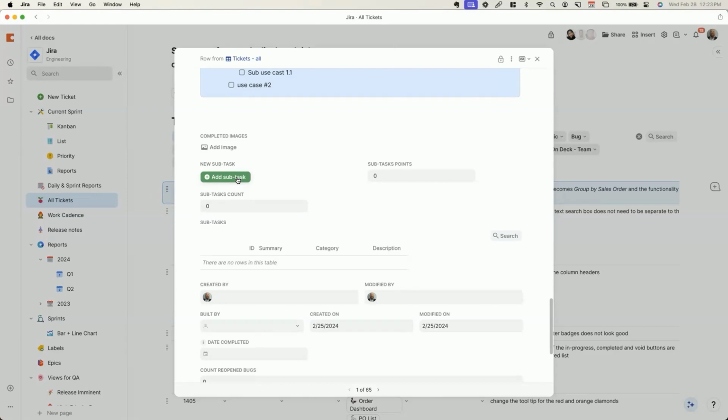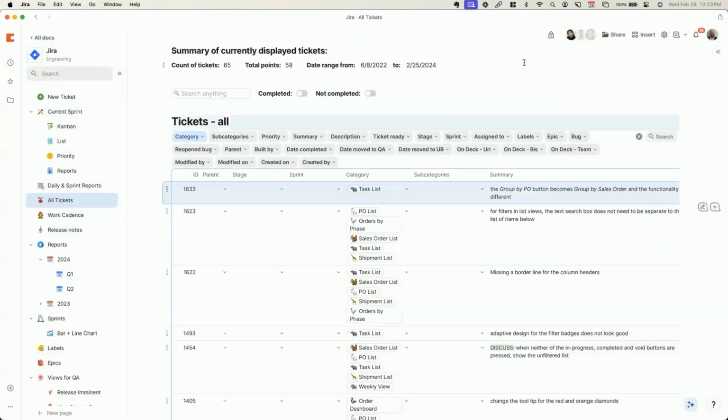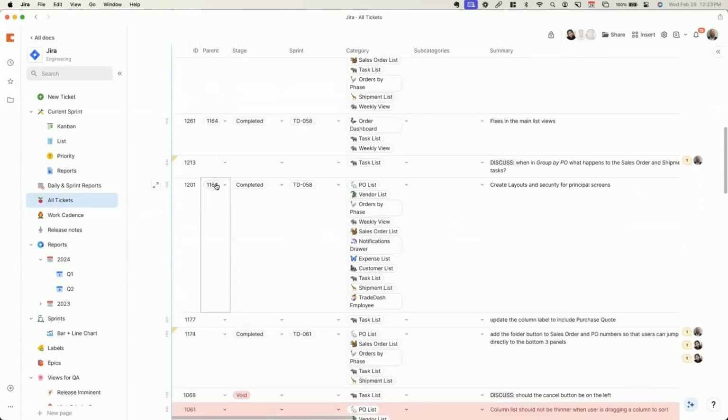So we don't have a table of tickets and a table of subtasks. We just have a table of tickets, and some tickets know that other tickets are their parent. That allows us to write huge tickets for other people to break up into sub tickets. When it comes to reporting, we don't have to cobble together information from a couple of tables. It's just all in one table. And I can also see how many tickets have children and how big they are. That's what the column called parent is. So some tickets have a parent.